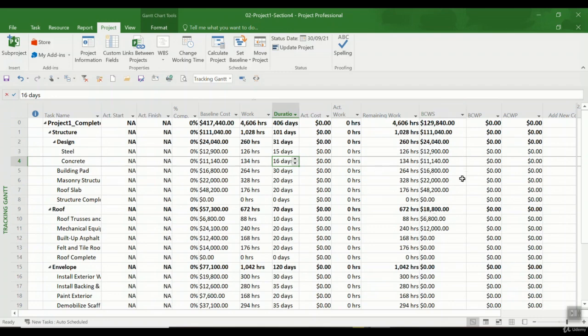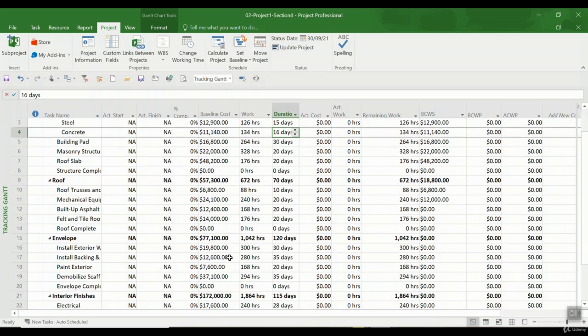Look at here. You see some numbers are populated, and these are the numbers called budgeted cost of work scheduled. It says that until the end of September, I should have this cost for each of these tasks, and as you see, they are completely equal to the values in the baseline. If I change to another baseline during the project, let's say I take another snapshot and put it here, then that baseline will be populated in the BCWS.